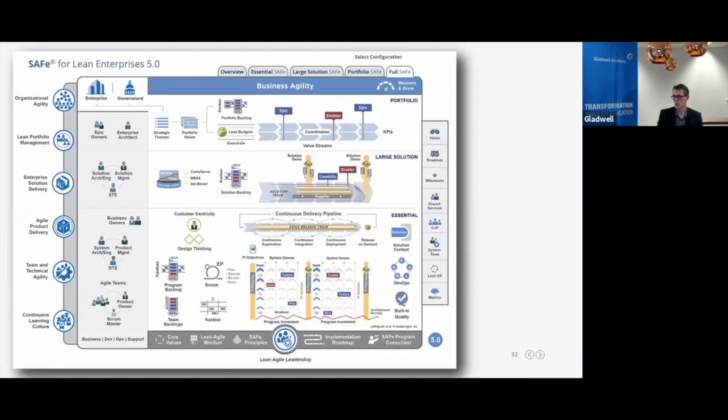Dear stakeholder, know this upfront. If you see ways to make it happen, so that we can influence it, by hiring a new person, by making sure that we have that test environment available or whatever, then of course we can take it out of stretch and put it into the normal committed objectives.